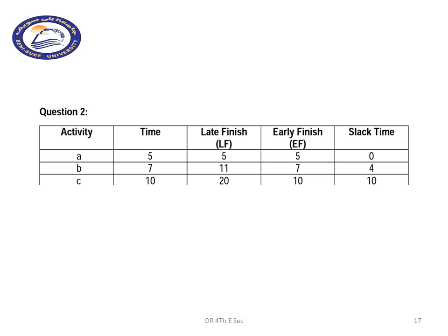The late finishing time is the time that is written at the end of the activity in the circle, that is the latest possible starting time at the end of the activity that is being asked for. Here for activity A, it will take 5 weeks.